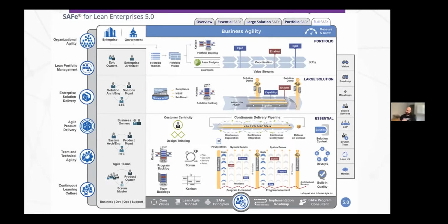It sounds very software-like. But the emphasis, at least for us, when we're talking about Jira and the implementation of Scaled Agile, a lot of it ends up being in the bottom half of this, where Essential SAFe happens. So we're talking about the release train, which is essentially kind of a team of teams. It's not exactly that, but for now, let's keep it simple. They align along what's called a value stream, so it's not quite lines of business as traditionally businesses end up doing. But you'll see that different teams can use different methodologies still. You could still have a team working in Scrum or XP, or different teams using Kanban.